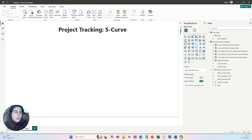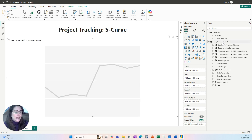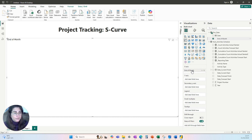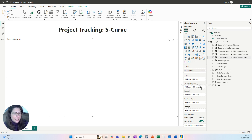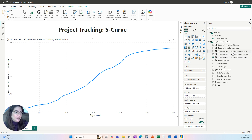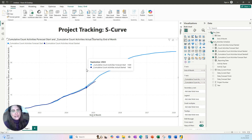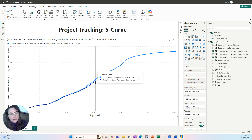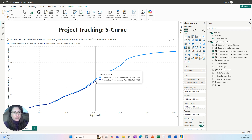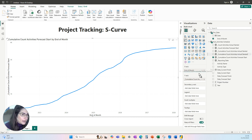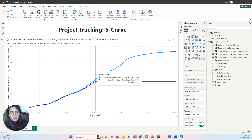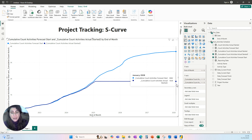Now to build our S-curve, it's very simple — we just need a line chart. For the X-axis I'm going to use my date, and for the Y-axis I'm going to use my cumulative count based on my forecast start date, and then the cumulative count based on the actual start date. You can see that it already has the expected S-curve shape. The actual start line stops at my cutoff point. I'll show you what would happen if you don't use a cutoff point — the line extends as a flat line because nothing else is happening after that.